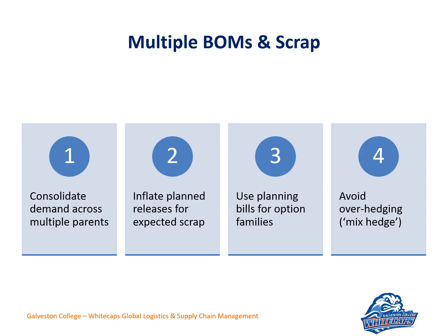And I had to go have a very jolly discussion about how we have a reorder point, not time, and we straightened that out so we could get the product there, because we had to shut down a production line for something as simple as a little 5 cent wire, on a $38,000 product that we built 100 of a day.